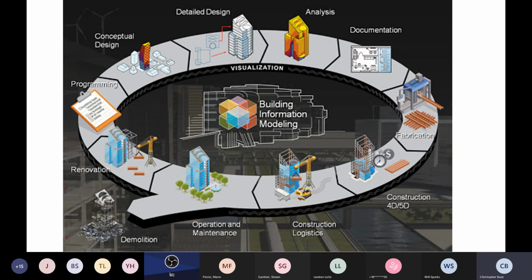going into Oracle or Autodesk products like Assemble, and having a cloud version of that, and then also not only tying in the overall construction schedule, but getting into the 3 week look ahead in the day-to-day operations. And I will say that we've gotten to the point now where we are inputting that information from the field directly to the model. So we have a very accurate idea of cost as a lagging indicator, and turning that into a leading indicator and planning it out in the future is where we're headed and what we're starting to do.